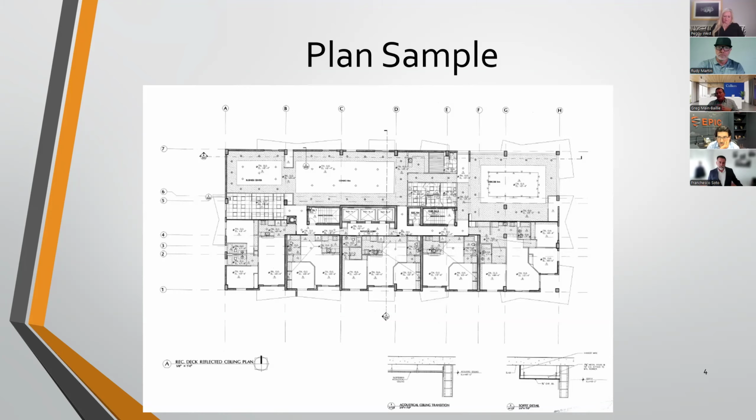So really, the very first document that you put out as an owner requesting an engineer or an architect to come and design whatever that capital improvement need is extremely important to have that initial contact with that consultant, rather than the property manager, as an example, going to the market because he knows that there is an RTU replacement and just asking the contractor to provide a replacement piece of equipment, which typically doesn't result in an apples for apples submittal from a contractor or a vendor.